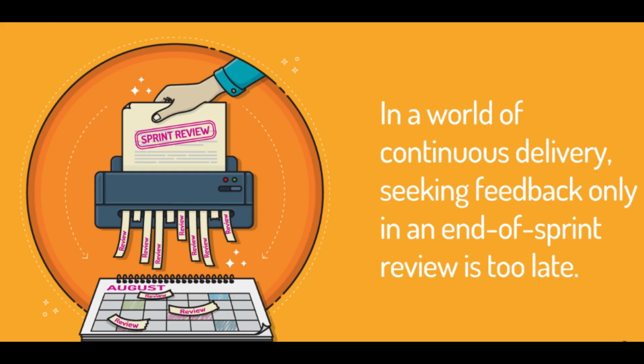Now we discuss the same scenario with transparency. The same developer A mentions the problem in the daily scrum on day 1. Developer B has solved a similar problem before and offers help. They solve it together in 2 hours. The feature completes on time.